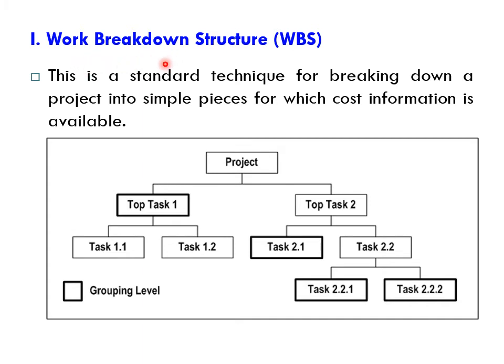This WBS serves as a framework for breaking down a project into simple pieces for which the cost information is available. Okay, it defines the smaller work elements. These are the work elements. It defines these elements and their interrelationships, collecting and organizing information, developing relevant costs and revenue data, and integrating these project management activities.